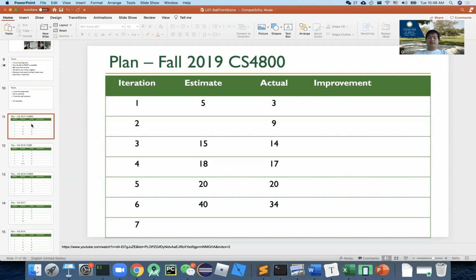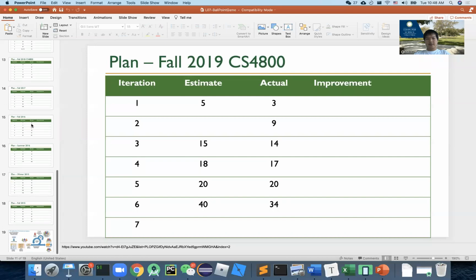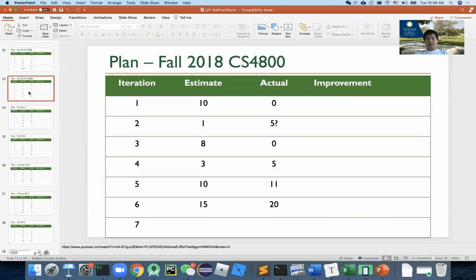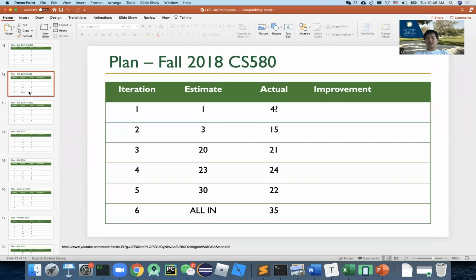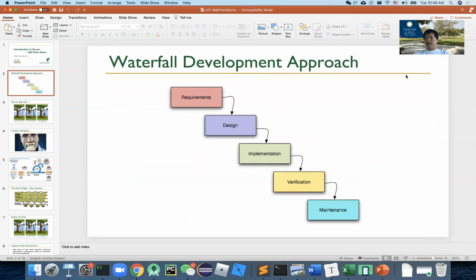All right. So anyway, guys, here we can't play the game, but I just want to give you the idea that we are trying to use this game to show you the idea of iterations. Iterations is the core fundamental concept of Agile development. It's really easy, I already explained. Previously, we give you 1 year, you do 5 steps, one after another. Now I give you 1 year, you break it down into 12 months, and every month you do these 5 steps, one after another. That's it, that's called Agile.